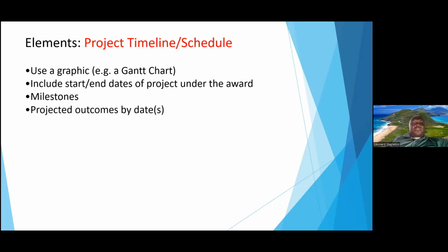Then you have the project outcomes and then you put the date. This is simple. Once you have the outcome, you put the date. You could put an estimated date, but when you're doing the report, you have to put the actual date when the thing was done. Because there are times when what you propose in terms of time, money, and even some of the activities change. That is not wrong, not a big problem, providing you have communicated the change.